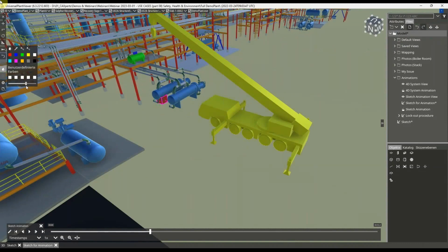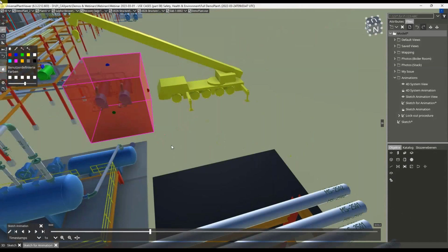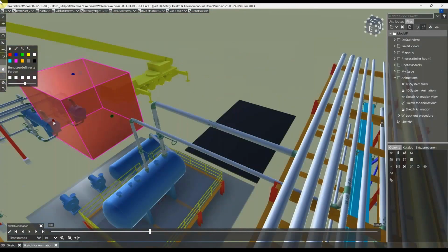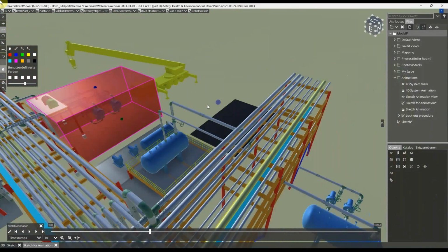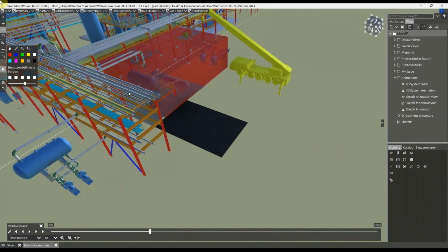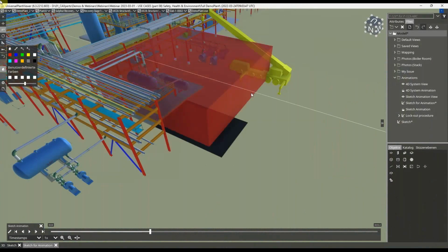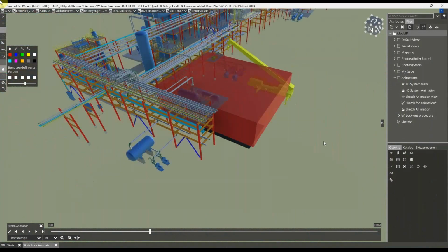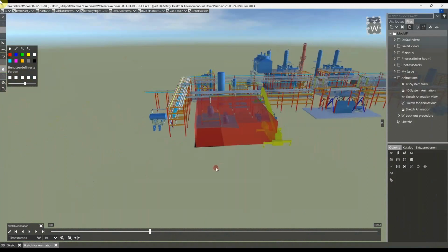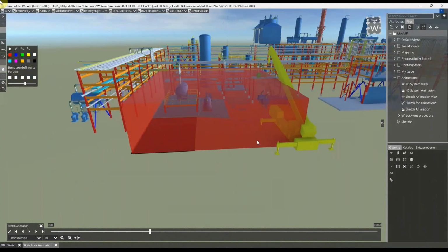So I'll take red again for dangerous zone and making sure that wherever the crane lifts the weight over is basically defined as a safety zone, creating a reserved area with only restricted access. So no parts that drop off or whatever could do anyone any harm.